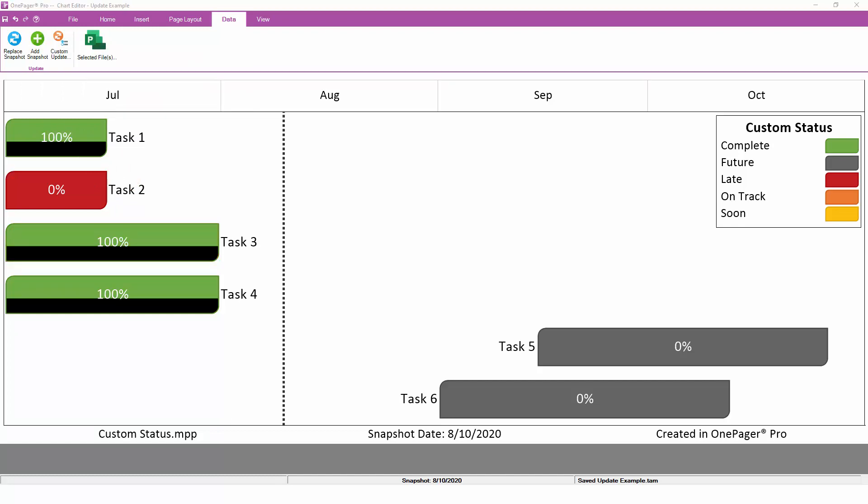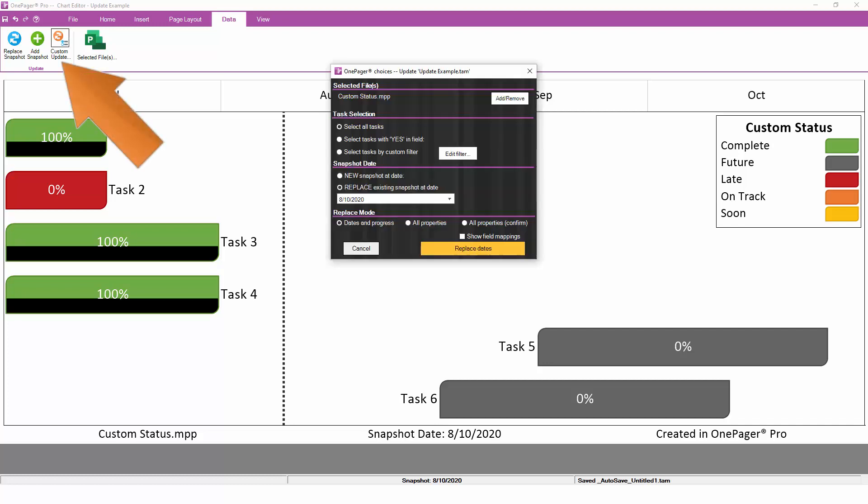If you want the full set of update options, maybe because you need to refresh your task names or because your WBS outline levels have changed, click on the Custom Update button, and you'll be able to choose all properties versus dates in progress, as well as other update settings, just like we showed earlier during the push update.